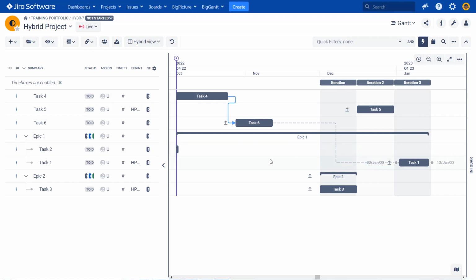Okay, so with our current configuration, we have a way of planning the agile projects using a board and separate iterations and syncing with a Jira board. We have a way of planning agile hybrid approaches or projects. So basically we can plan part of the tasks in the board as in iterations and part of the tasks here normally in Gantt chart, and later create dependencies between the two.